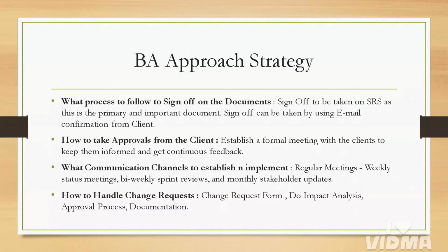Okay. So after that we'll prepare one report, and then we'll submit it to the project manager, and based on the report, we'll decide whether we need to add the change request to the system or application or not. Okay. So that's how a change request will be handled.